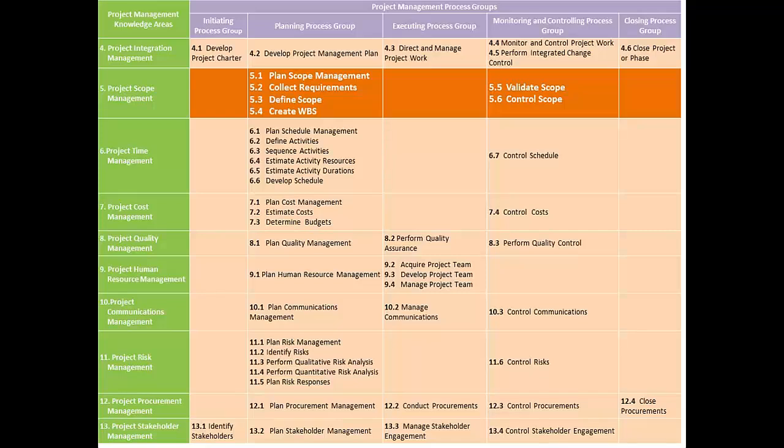As we said earlier, we start a project with a contract and a SOW that comes along with the contract. The very first document that we create in the project management lifecycle is the project charter. Once the charter is created, as part of the initiation process group, we identify all the stakeholders.